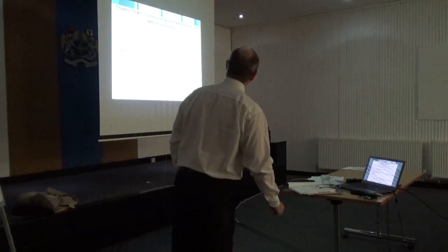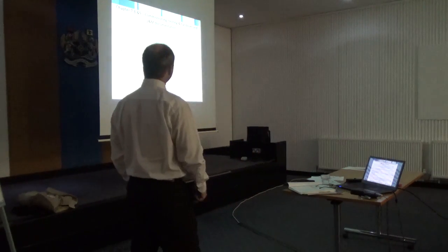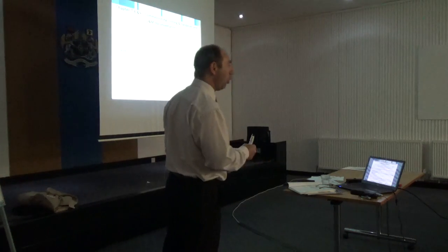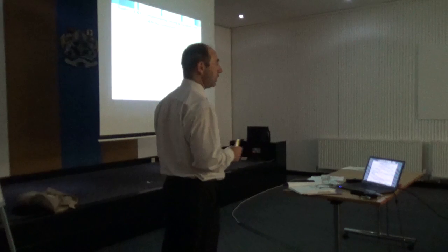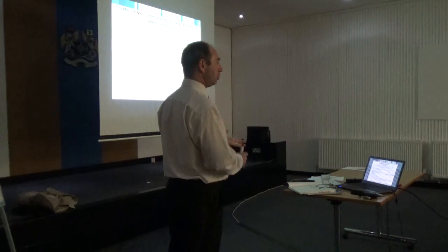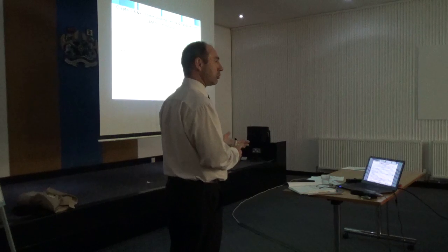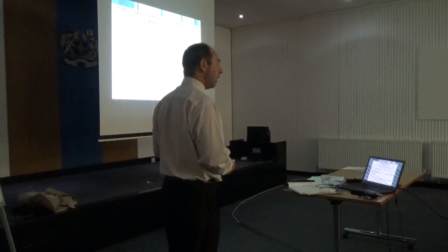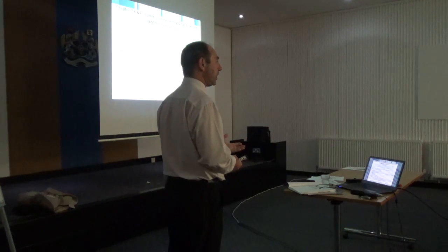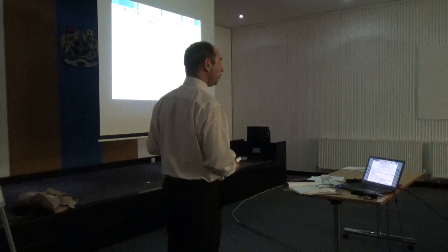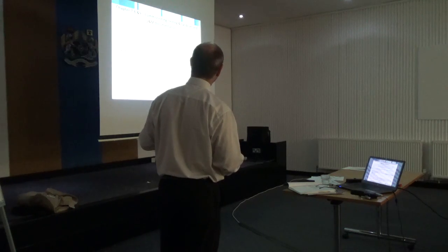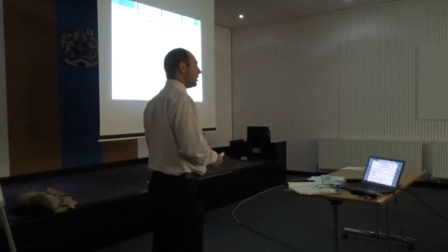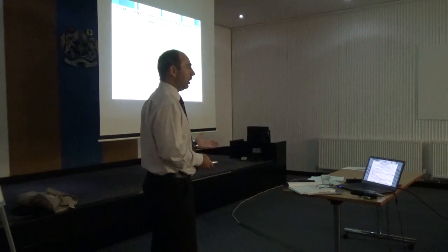Chapters 7, 8 and 9 consider commissioning, testing, handover and O&M documentation. So for me, possibly the most important area for a facilities manager. It's got to be commissioned properly. Well, we all know what happens in construction programmes. It all gets squeezed. It doesn't necessarily get done properly. You get something which doesn't necessarily perform the way that you want it to perform. And why does that happen? Well, generally because the builder's under a financial penalty if he doesn't hand it over on time.